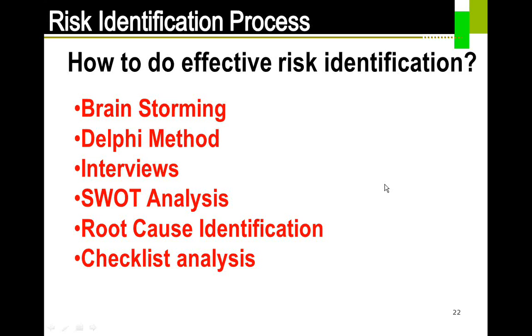The best way for you to identify the risks with the newer technology is to identify the experts who have worked on this particular technology earlier, and then say, my organization is going to use this new technology. I would like to understand what risks you had undergone and how you were able to manage them. Those are all called subject matter experts. Ideally, this is done by sending emailers, surveys or polling, and they would come back and say, yeah, this is the right thing, this is not the right thing.